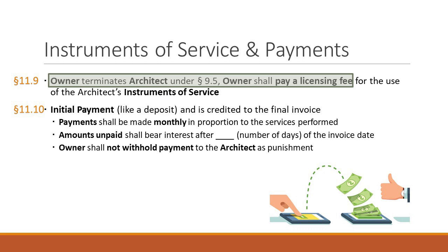Except for, of course, the architect may agree, or if there's already been a mediation or arbitration. Sometimes, for my long projects that last a couple of years, if a dispute arises during the course of the project, we will try to resolve it real time as opposed to waiting to the end. And sometimes I've had decisions where a party has been found liable under an arbitration while the project is continuing. In that instance, the owner could then withhold the money from the architect. But any other instance, this provision says, if I did the work, you pay me. If I screwed up, well, we'll fight that out and pay another day, but you can't withhold this from me.